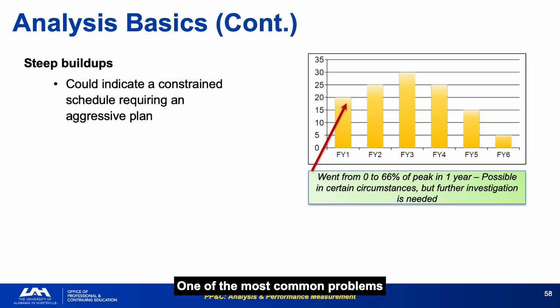One of the most common problems in development programs is assuming the workforce can ramp up faster than reality allows. Historical NASA data shows that organizations often underestimate the time required to recruit, train, and integrate skilled personnel, leading to overly optimistic cost and schedule plans. As analysts, we use established benchmarks, such as spending approximately 15 to 20% of DD&E funds by preliminary design review and limiting operations workforce growth to about 30% per year, as starting points for evaluating plan credibility.